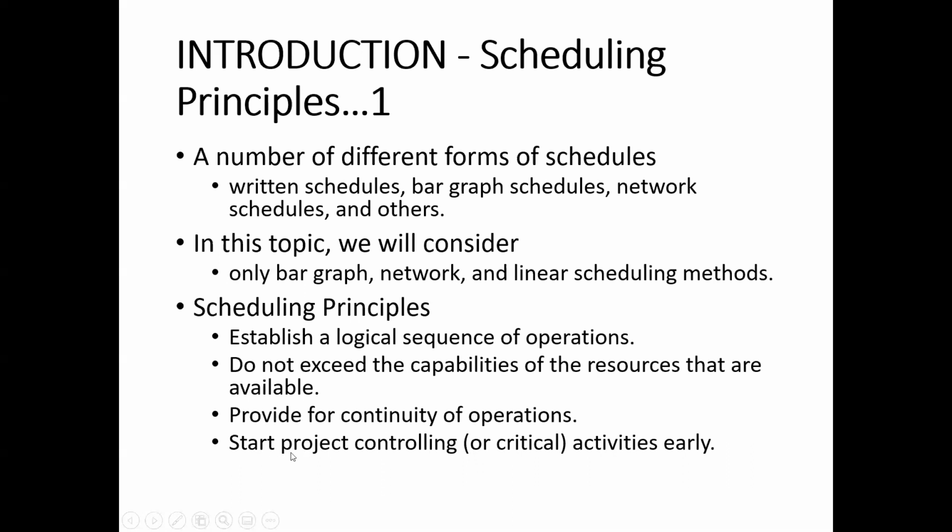And start project controlling activities early. There will be a number of activities on the project. Some will be critical activities, some will be non-critical activities. Critical activities are those that, if delayed, will delay the project.